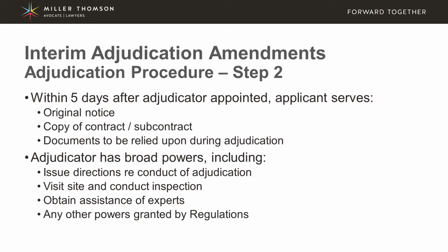So the second step of the adjudication process provides that within 5 days after the adjudicator is appointed, the applicant has to serve the original notice of adjudication, a copy of the contract or subcontract, and documents to be relied upon during adjudication.